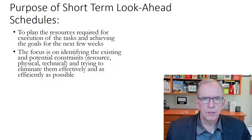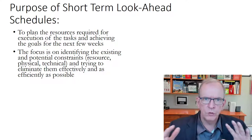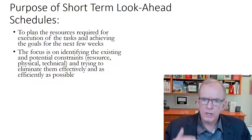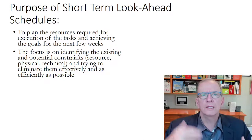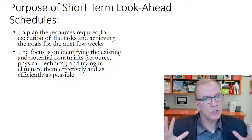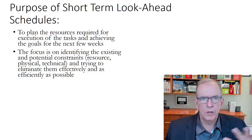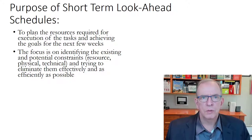As I've mentioned before in courses that I teach, the site superintendent on a project really tends to take a shorter view of things because they are very close and in tune to the work that is coming up — work coming up to say the next milestone — much more so than work that is coming up a year from now. Project managers, on the other hand, are very attuned to the long-term milestones for the project as they're dealing with clients who are very concerned about meeting major phase dates and milestone dates to ensure the project will be ready when they need to use it.